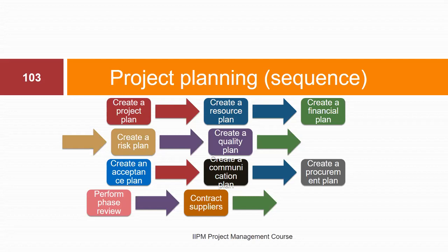Okay, now if you're following what I'm saying with a picture in view, you could see that you have a table. On the table, you have the first column as tasks. On the second column, you have your resources for the tasks. On the third column, you're possibly going to be having the amount of money you need for each of those resources for each of those tasks. So for tasks that have multiple resources, you are having multiple financial appropriations to them.